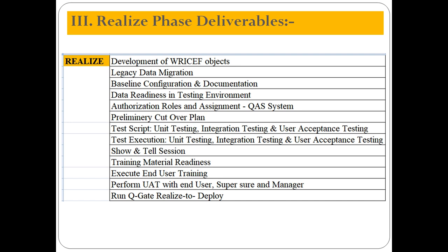So only your module specific process you have to execute, right? Based on the BPML process we already addressed. For every module we addressed the list of processes, so all the list of processes we need to execute in your module. That is nothing but the individual module consultant having to execute all the business processes based on the BPML in the development server. So that is unit testing. Okay, what is integration testing?